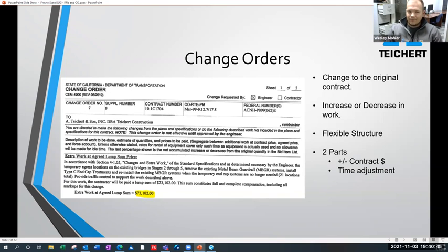Well, then maybe you don't know how long it's going to take to do those trees, and it's just something, hey, we got to do it tomorrow or next week, and it's not a whole lot of work. Well, then you could petition the agency or your owner or your prime contractor, hey, I want to run this on T&M. So I want to get paid for the time and materials it takes to do this. Not just give them a price, hey, it's going to cost us 30 grand to remove these trees. It's going to be whatever it is going to be.